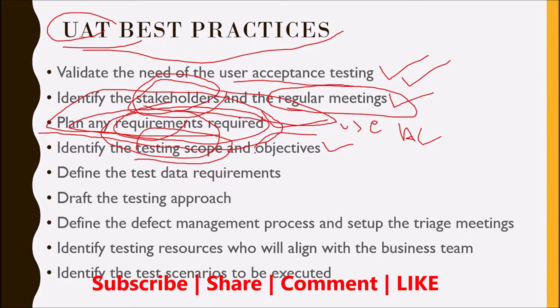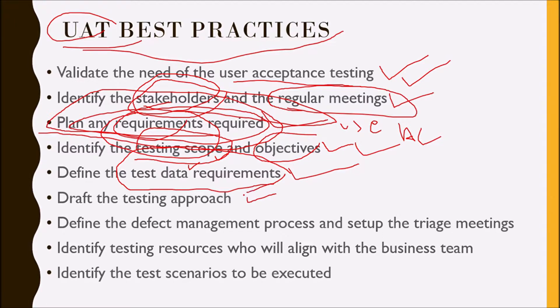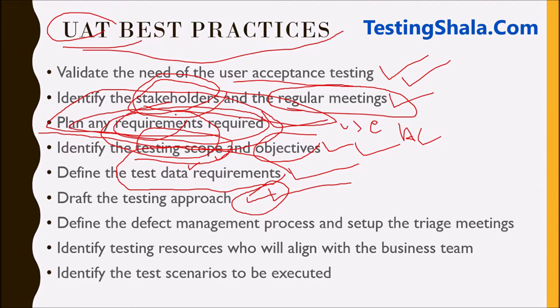The next important item is identifying the testing scope and objectives — what are the things we are going to test as part of UAT. Once we identify everything it needs to be documented, including the objectives. You should also understand if there is any requirement for test data. Once the scope and data are clear, we should come up with the testing approach — what types of testing will be performed against the requirements shared by the business.